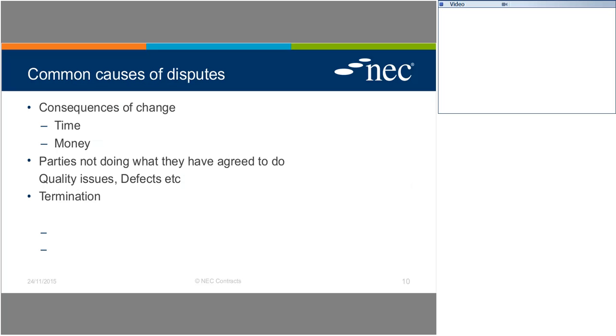So what are the common causes of disputes? Well, it's nothing new, quite frankly. It's time and money usually in construction projects, money usually being the end of the adjudicator's decision. What causes arguments over time and money tend to be around things like design, site access, poor quality construction workmanship and materials by the contractor, interference in the works, and everything that costs money in every construction project.